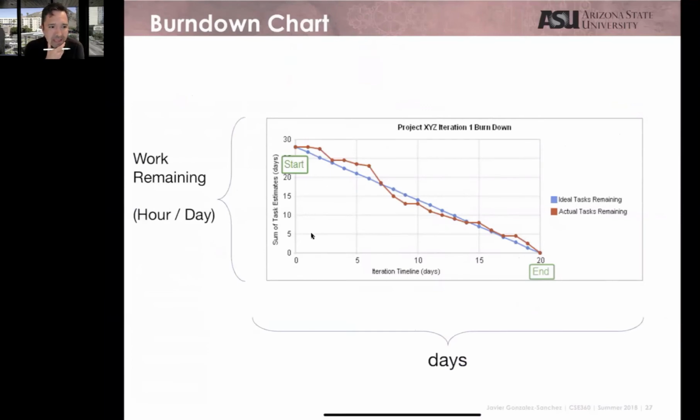Because we're meeting every single day, I can create this plot and I can be in day 1, day 2, and so on. And assuming that you're going to be working, I don't know, 2 weeks, 3 weeks, but 2 weeks here. Every single day, the team is going to report to everyone else, and the product owner can create this kind of plot.